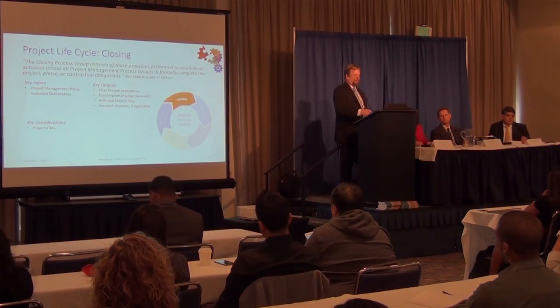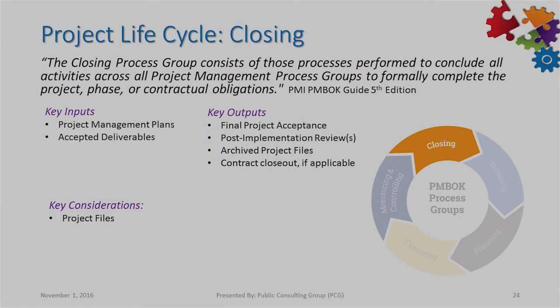And finally, the last process group that's important from the PMBOK perspective is the closing process. Remember that a project is a time-boxed endeavor that comes out with a product. So great, we initiated the project, we planned the project, we monitored and controlled it, and we executed it. So finally we get to close the project. Your key inputs here are all your accepted deliverables, all your project management plans, and you're going to have a decision on how those will be archived.